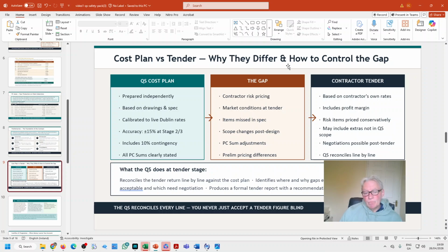Often, since January the 1st, installation has gone up by 30%, and we are now at the end of April. 30%. Most materials have gone up by 6-7%, some by 10%, and installation by 30%.